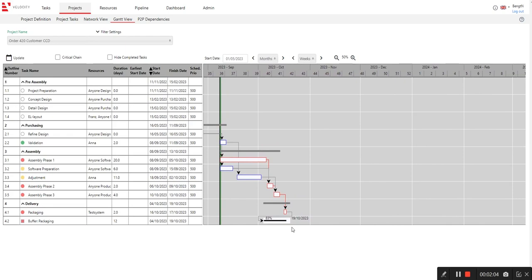Here we have the delivery date, the 19th of October. And we can see here is this buffer or shock absorber. And we can see here is a critical path remaining, or a critical chain of events that is into this buffer, 83%. And so the tasks on this chain, they are red, because they are in the red zone. Other tasks, like this one, have lots of slack.